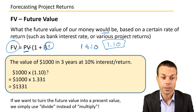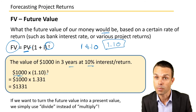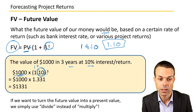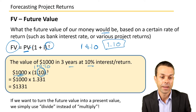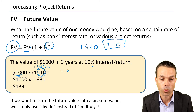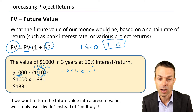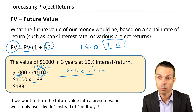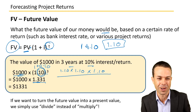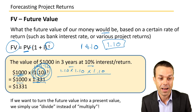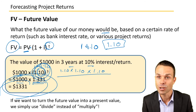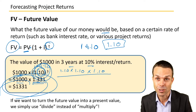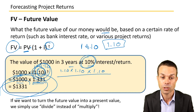Let's work through an example: the value of $1,000 in three years at 10% interest. We calculate $1,000 times 1.1 to the power of 3 — that means 1.1 times 1.1 times 1.1, which equals 1.331. So $1,000 times 1.331 gives us a future value of $1,331. That's how we figure out the future value at a given rate of return.